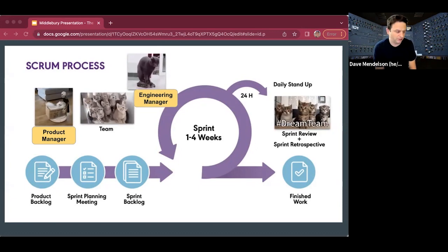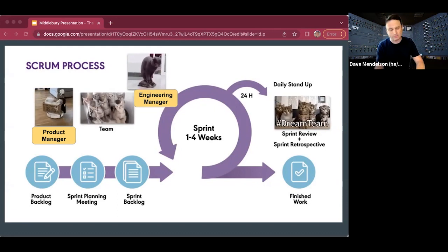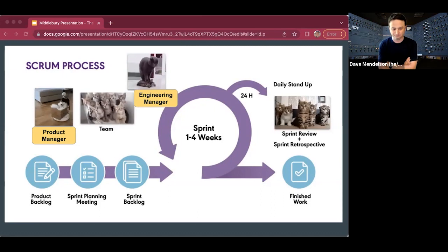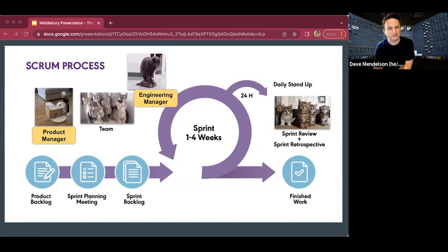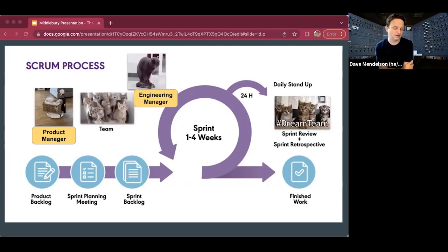Yeah, there's a few things. I think number one, the team could be doing a really bad job of scoping out their work and not putting in the elbow grease, if you will, at the beginning of the process. So they're more or less randomly throwing a bunch of stuff up on the wall and hoping, hope as a strategy, which is never a good way to function. So that's really a problem. You really do need to understand what your team's capable of producing in a given time period. It's not going to always be exact, stuff happens, but you should have a pretty good understanding of that. So that's one thing that is typical, the overcommit.